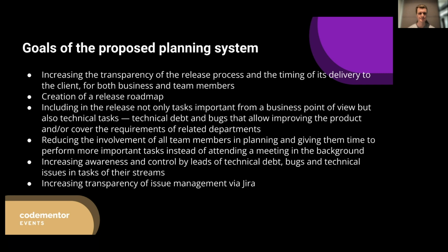Creation of a release roadmap. A roadmap is a thing that helps not only the business, not only the team, but also you. It can serve as a vector of development. You will always know what you want to do, and you don't need to remember it. You can just put it in a spreadsheet or anything else to see your future plans, and you may fit new features and new business requests into this roadmap and coordinate. And you may discuss new features and new requests with the business based on this roadmap. This roadmap will help you significantly.